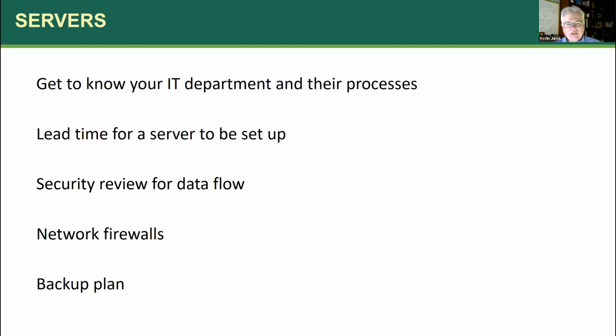I've seen a number of physicians get aggravated because they expect that, well, I've decided we're going to use this software, let's get it going. Things don't move that fast, and it's going to take a lot of people to get these things set up. So lead time for the server to be set up, time to work with the vendor to implement their software on it. Even like I said, before we get to that point, security review for data flow.